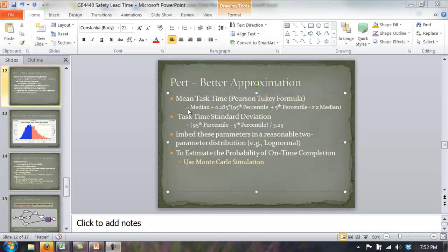In the classic PERT formula, we were given three estimates — the optimistic, pessimistic, and most likely — and we treated those as the minimum, maximum, and modal value in our beta PERT distribution. What we're going to do now is treat the most likely value no longer as the mode, but instead as the median. This comes from experimentation showing that people most often try to pick about the middle value — they're better at picking the middle value than the modal value.